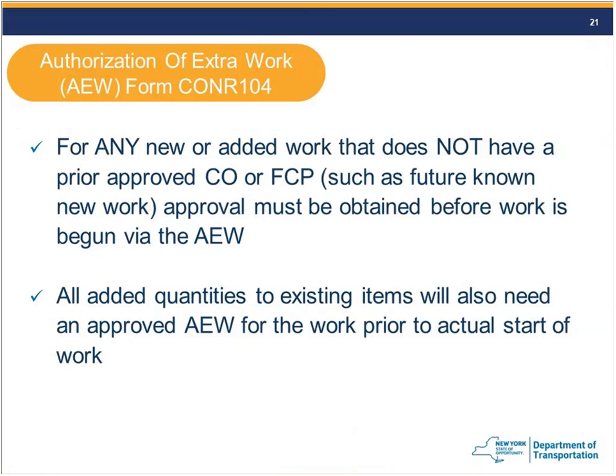The CONR 104, or Authorization of Extra Work (AEW), is required for any new or added work that does not have a prior approved change order or FCP. Approval must be obtained before work begins. This applies to all new items and all added quantities to existing items. If the AEW is for a field change payment, there are additional considerations. Eli Cohen will now walk through the AEW form in detail.